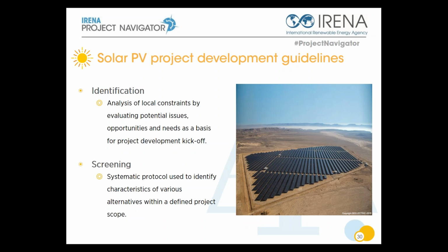I'm not going to all the showstoppers. You will find in the guideline that, for example, we look at permitting, at analysis of geotechnical parameters and cost of, for example, grid connection, which are very important to understand that once you start the project, once you spend resources, man hours, money on a project, if you haven't checked that your configuration is suitable, you will find problems that could, let's say, stop your project.